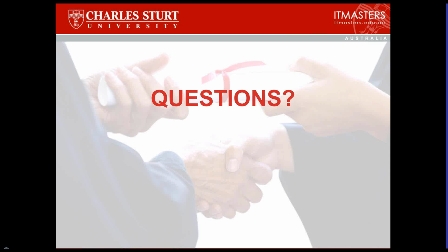So how do you know when you've got enough to fill in a wave? Well, it's going to be a combination of prioritization, that is sequencing. What stuff should you do first? That's going to have risk management components that we just talked about. That's going to have capability components that we just talked about. And that's going to have practicality components where, for example, your project manager might have what they think is going to be a great wave 1 and stuff that's going to go in it.